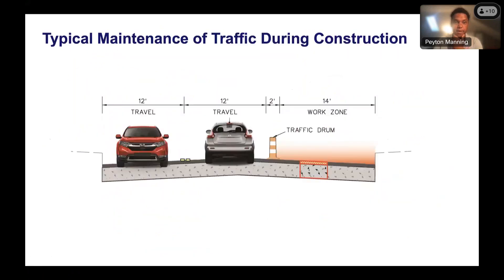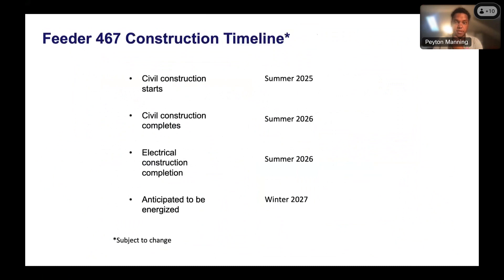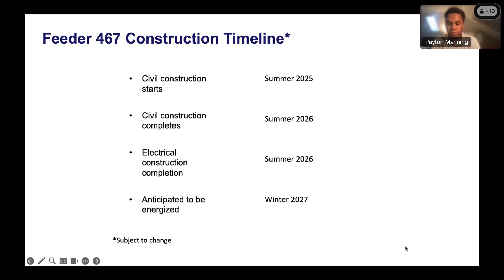To review the timeline: we're anticipating construction to start summer 2025. It's approximately a 12-month project, so civil construction — putting structures and conduit below ground — should finish by summer 2026. After that, the PEPCO team will return to work within the manholes to pull wire during the electrical phase. Once that's completed and the power lines are underground, the system will be energized, and about a month or two later you'll start seeing existing overhead lines come down, though most poles will remain.